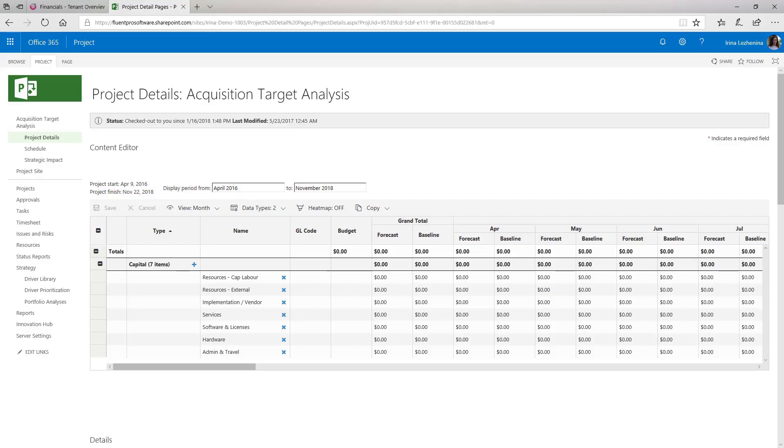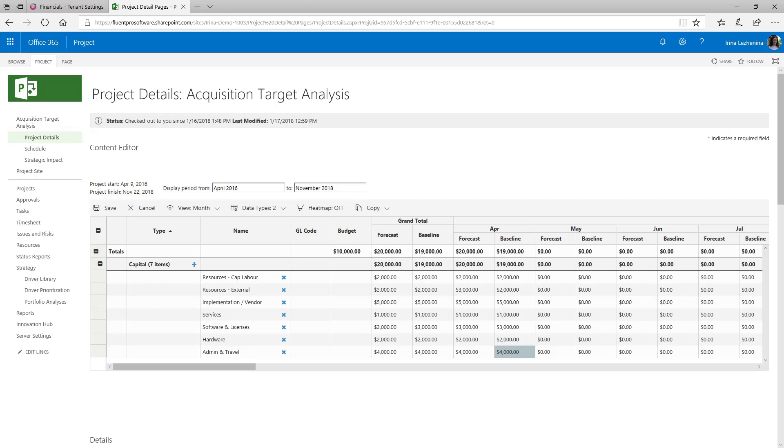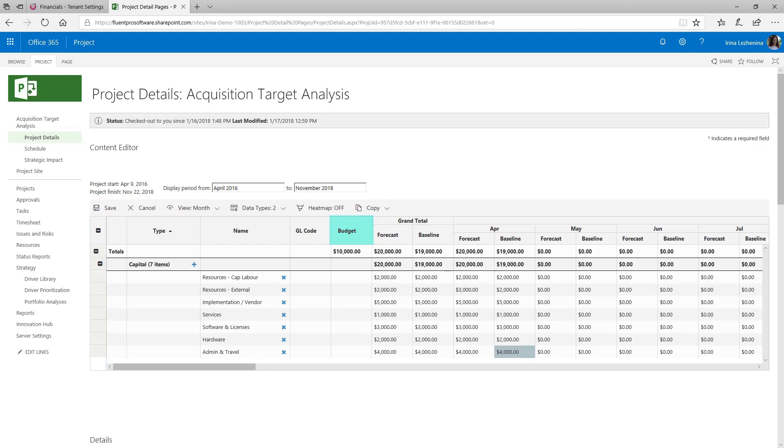So let's create project budget. I will open Project Online environment, open one of the projects on the PDP page where we have previously embedded FluentPro Financials and create project budget. I will fill in Forecast and Baseline fields. All the totals are calculated automatically. And budget field displays the information that is specified in the total budget project custom field.